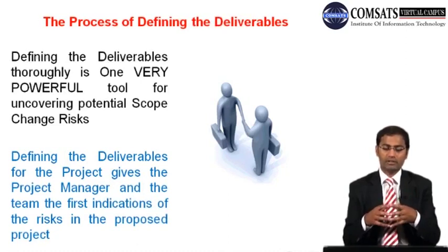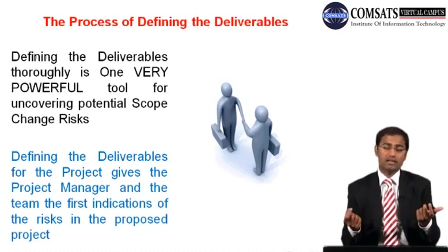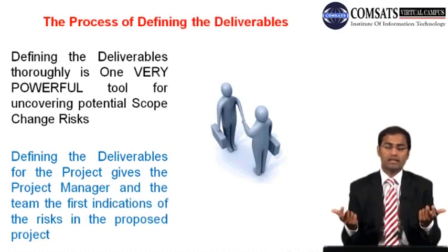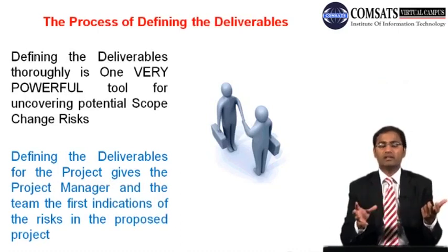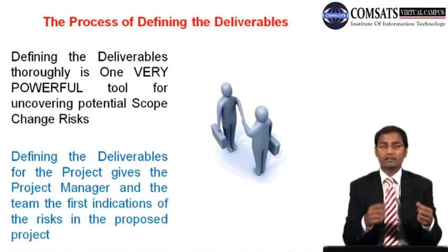Defining the deliverables for the project gives the project manager and the team the first indication of the risk in the proposed project. If the deliverables were not defined earlier, and now a stakeholder or customer says, well, I do not want that product, I just want it in a different way, that is a big risk.